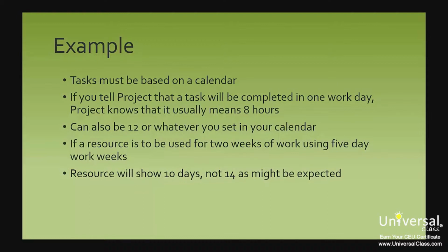By the same token, if you set up a resource that will be used for 2 weeks of work, measuring weeks by a 5-day work week, it will show a timing of 10 work days, not just the standard 14-day period that typically comprises a 2-week period. Just be careful. If you schedule a 2-week task, but the resource needed to accomplish the task is set for 3 weeks, the task will not show as completed after 2 weeks. It will be 3 weeks instead. This will all make more sense as we move forward and learn more about the program.